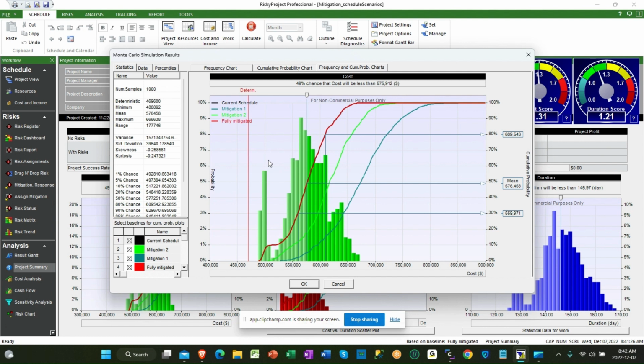We've shortened, sort of abbreviated, the mitigation steps, but added more schedule uncertainty to the activities just to see what would happen. And we get this mitigation coming out of the mitigations. And this would be one of the things we could go in and say, okay, we've gone through our mitigations, we've created them, and you can create different baselines using the same data and slightly change it. And you can come up with a scenario analysis.